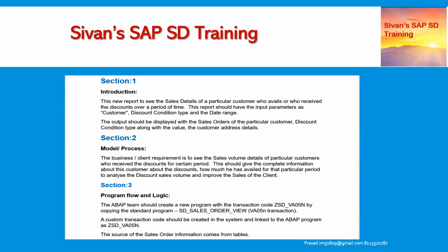So these are the sections. We need to 100% make the changes. So we will receive the one CR number and start of CR and the date when we are doing it. So we have to incorporate on top of section 1, CR 1005, date 18th June 2024 or 23 or 22, whatever it is. So like that you have to specify, and then end of every section.